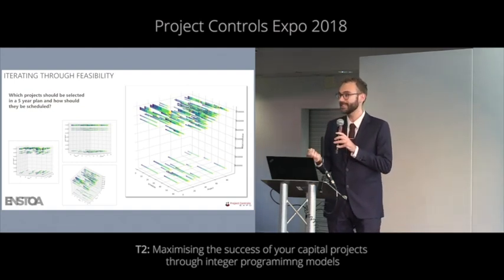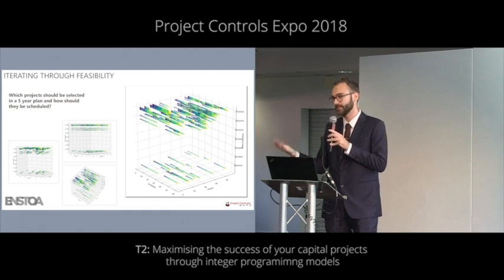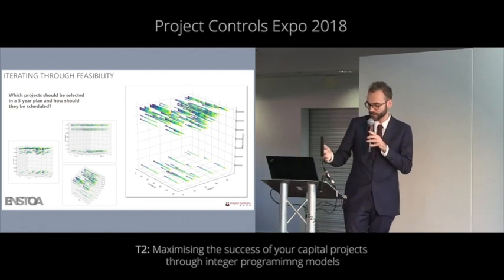typically each phase has a distinct cost profile. Construction is much more expensive than some of the other phases, design and closeout and feasibility studies. So it's important to have construction phasing.